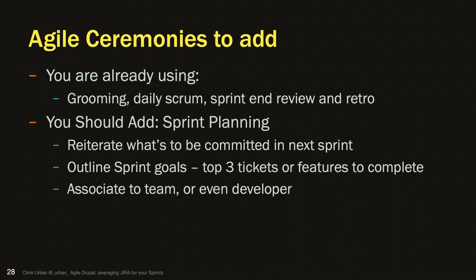The other reason I say this is that if you were using the developer field, and you have work that's part of a longer string of things, use the person that was associated with the original work, as Adam was saying, the subject matter expert. You can use them to help guide that work, so you're not putting all the effort onto another developer that hasn't touched the work before but knows what the overall process is. You can use that field to say, so-and-so worked on this before, they should be the one to do this additional work, this extra round, or whatever the additional feature is. You want to keep those workflows streamlined and optimized. That was the reason for adding all those fields earlier. So, okay, next.